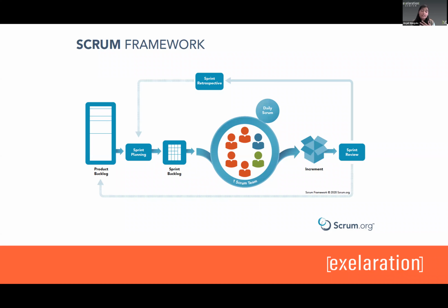In my personal experience working with other teams, typically we don't release at the end of every sprint. I've definitely been on teams that do it. I know a team right now that has 1 week sprints and ships their product out every week. That is what the client wants, and that is fantastic for them. That being said, not everyone wants to do that. It's completely fine to not have an actual release go out, but you should have a product that could go out. I think that's the big difference: it should be something that is completely functional at the end of a sprint, but it does not actually need to go out.